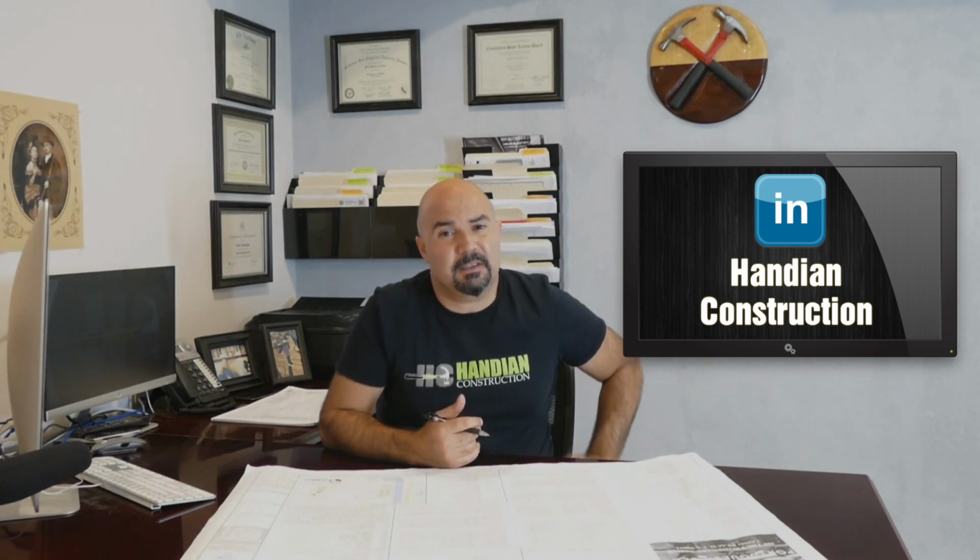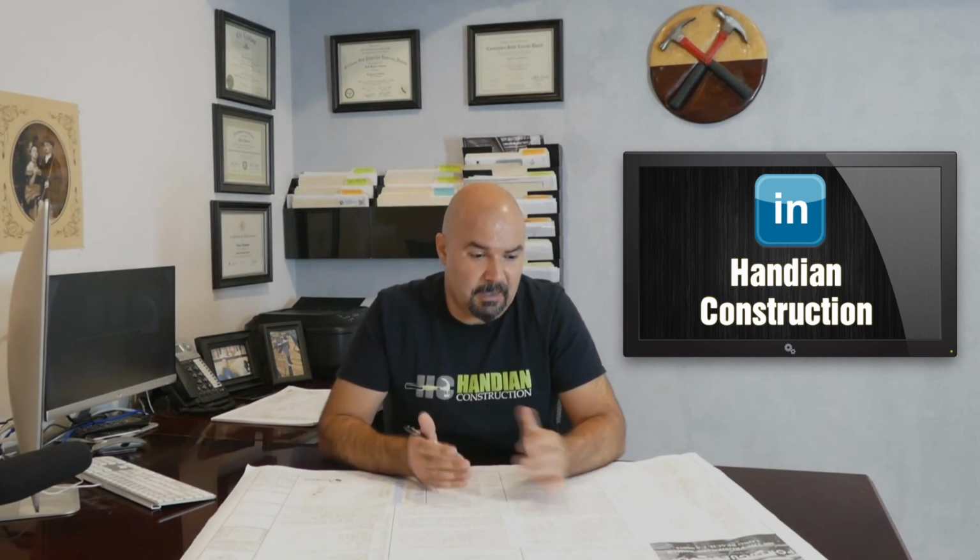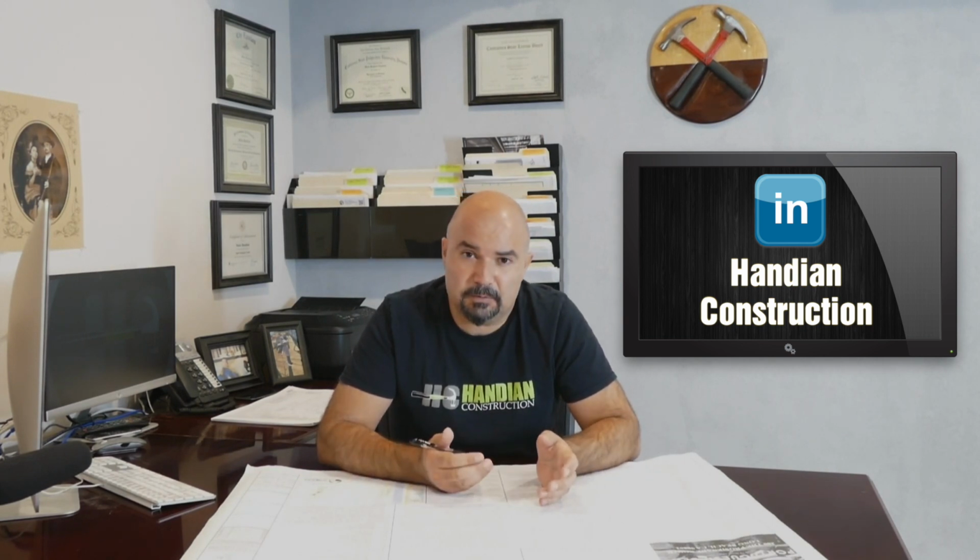Now the easy part on us to make sure that we make our deadlines is, let's say I have a certain sink that's in the way of something. We dug up the floor and there's some kind of a sewage line that we can't touch, or some kind of utility line. All I have to do, since we're a design build, is talk to the inspector and say we're gonna move it to the left or to the right, and we basically handle it in 5 minutes.